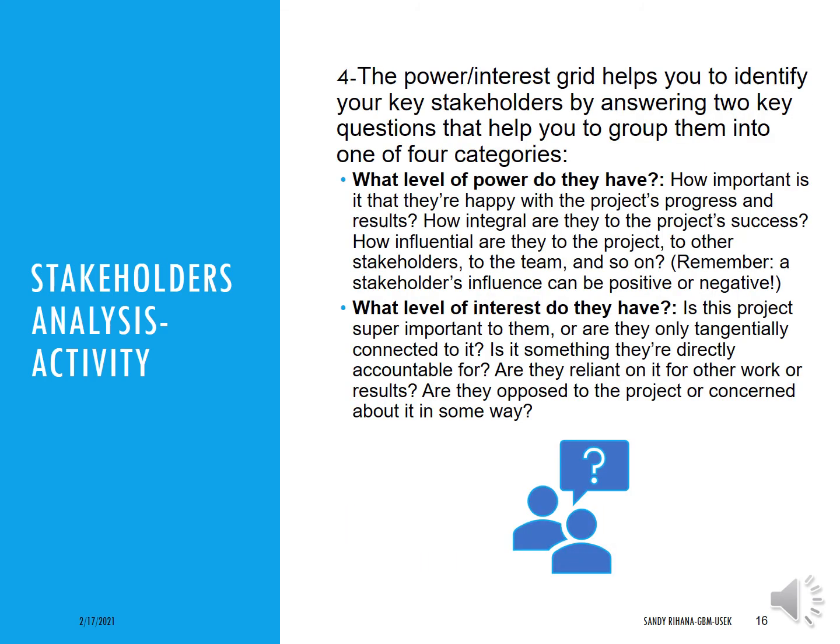So now that you have done the mapping of your stakeholders, you develop the power interest grid analysis in order to identify the key stakeholders by answering these questions. First, what level of power do your stakeholders have? Second, what level of interest do they have?